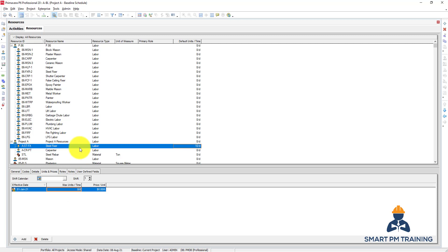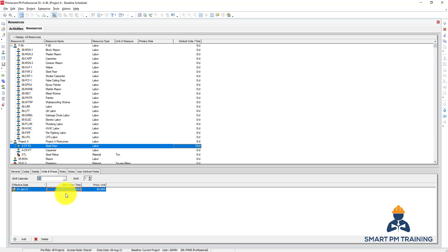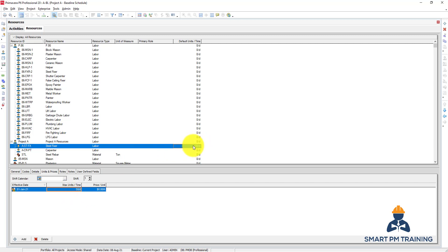Let's say that I will put 50, so this resource can work maximum 50 hours per day. But here the default unit per time is 10, so it means that I can have maximum five labors to work for 50 hours per day. So each labor is working 10 hours per day and I have five labors, so overall I have maximum units 50 hours per day or five labors per day. So this is the maximum units per time.